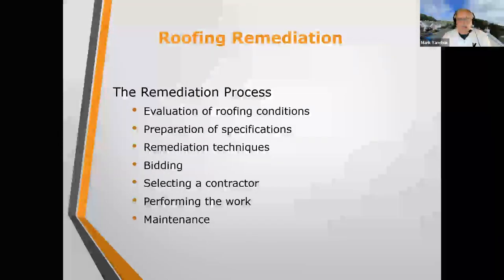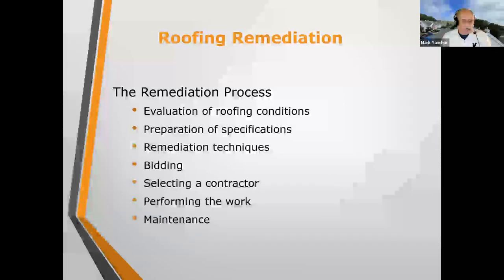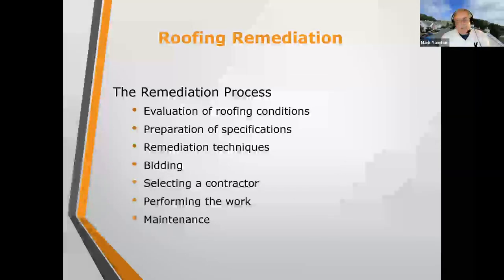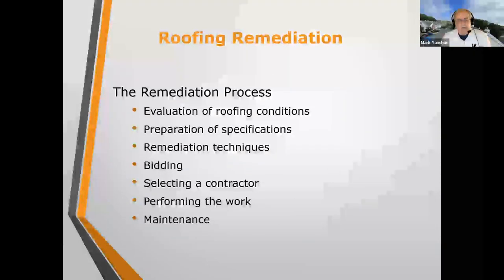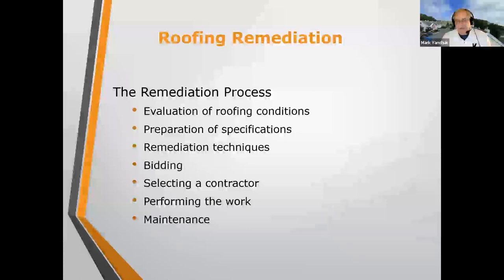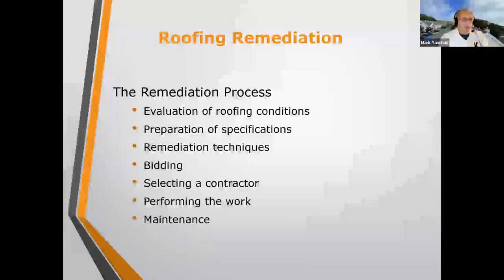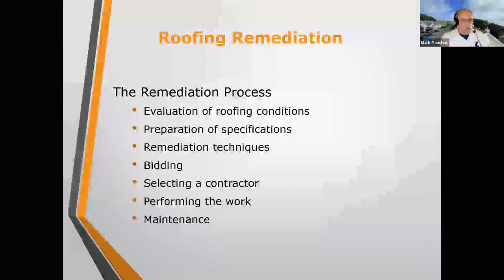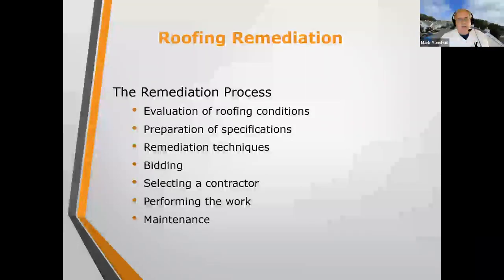To go over the roofing remediation process: a lot of times it starts with an evaluation of the roof. Sometimes you already know you need a new roof, so you'll go right into the preparation of specifications — that'll save you some money. If you're at the end of the useful life and want to replace the roofs, go right into preparing the specifications. Then there are different remediation techniques depending on your unique conditions. Once specifications are reviewed by the association, you go out to bidding — usually with pre-qualified bidders so you can compare apples to apples — then select the contractor, perform the work, and go into ongoing maintenance.